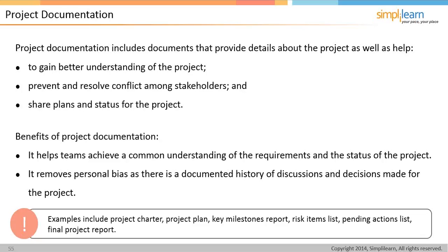So you might have some type of a management review group or an MRG that you'll meet with. The project leader, maybe even the team will accompany them, but more likely it'll be the project leader that meets with the sponsor and some other executives to provide a periodic update. Maybe as you go from the define phase to the measure phase to the analyze phase and so on, to report any updates. Here's where we were, here's what we've accomplished, here's where we're headed. By the way, in addition to any questions, here's what we need from you, if you do. So these are some examples of the different pieces of documentation that probably will accompany a report.